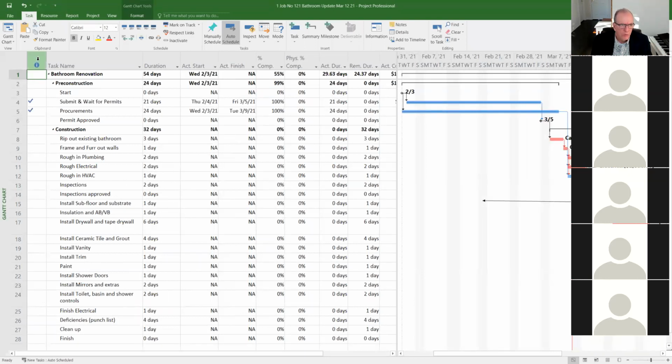And so usually that's one of the first places I look when I'm looking at one of your schedules. If Sanjay said, oh, I've got a problem, and I say, share your screen, one of the first things I want to see is the indicator column, because I want to see if he's added a constraint, added a special calendar, said it's done, that kind of stuff. So it's a very helpful column to see what's going on. Now, I think I would have said to you in one of the earlier labs, you try to avoid putting constraints on activities, but this is one example where it would be okay, all right?